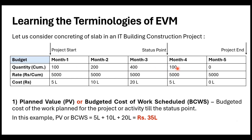As per the budget, the planned quantities are: first month — 100 cubic meters of concrete; second month — 200; third month — 400 cubic meters; fourth month — 100; fifth month — zero, since finishing works and MEP works happen towards the end. The budgeted rate is ₹5,000 per cubic meter, giving costs of ₹5 lakh, ₹10 lakh, ₹20 lakh, ₹5 lakh, and ₹0 lakh for each respective month.